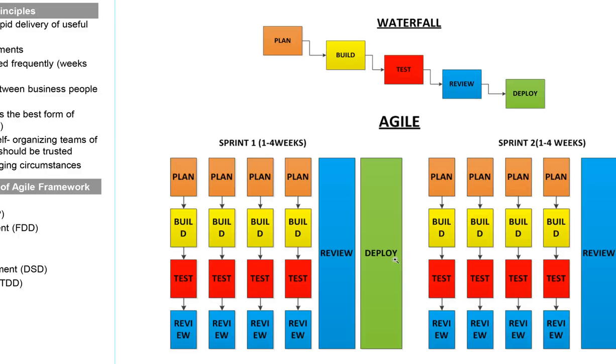Okay, so we have a working model by the end of week 4. An example of this in software development is we decide to complete the whole register process of a customer, for example. One of the user stories would be the customer should be able to log in, the customer should be able to create an account, the customer should be able to put in a username and password, the customer should be able to retrieve a password if for some reason they forget the password. So these are some of the user stories that would be part of the login process.